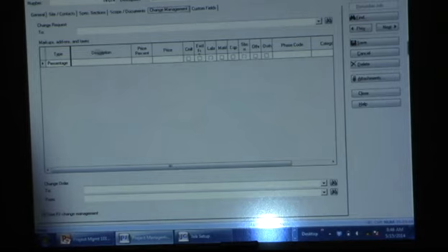You can set up your markups ahead of time. So what your overhead and profit is, if you have a different percentage on some contracts than you do on labor, if you're doing insurance and bond, you can make it as simple or as complicated as you need it to be. So if when you do a change order, you say, here's what it's going to cost us and here's our overhead and profit, you can just add a single markup line. Well, if we put on project management side, we put in the total, including the profit.